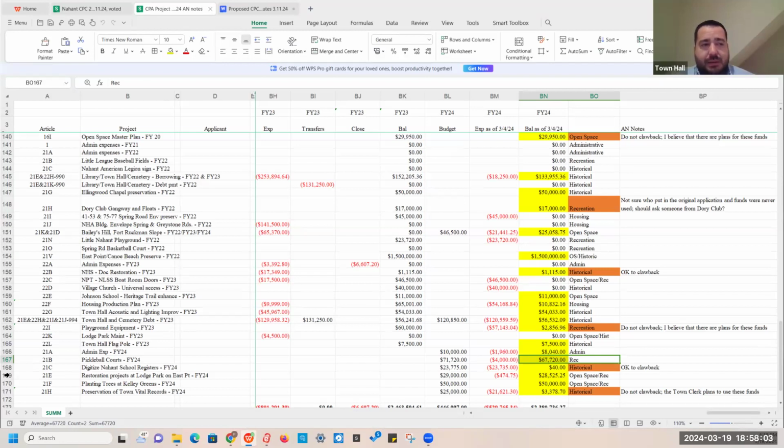It requires a study of the substation that National Grid would make us pay for. This is their way of kind of slowing down these types of projects. But at the same time, National Grid is working on an upgrade to that substation related to flooding resiliency and stuff like that. So I'm trying to loop it into one project so we don't have to pay for it.